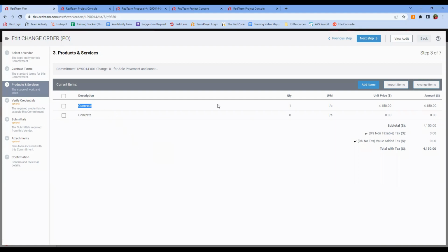It would show me the total for the cost code, and then it would actually show me a list of all the items that were included. So if under concrete, I had built mix, forms, labor for installation, whatever the case may be, I would see all those listed here with $0 values, indicating that they're included in the 4150 total for concrete.